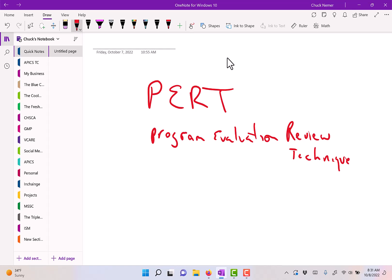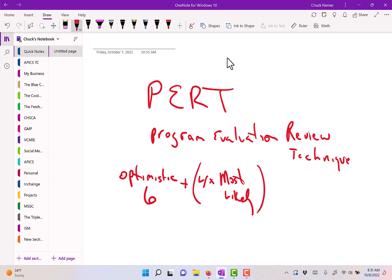What it looks like is a formula. It says we'll take the most optimistic time that you believe it's going to take to do the project or task—let's say it's 6, whether it's days, hours, minutes, or whatever—plus 4 times most likely. So maybe most likely is 8.